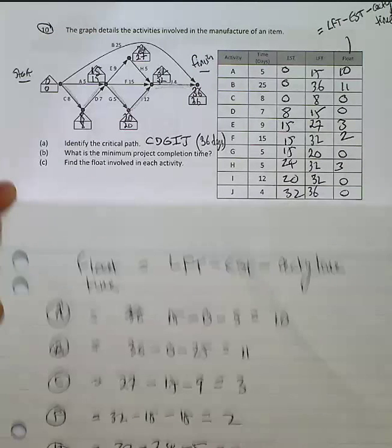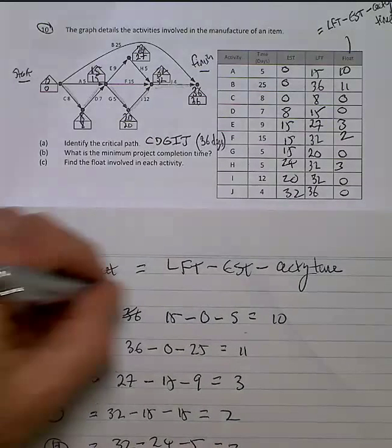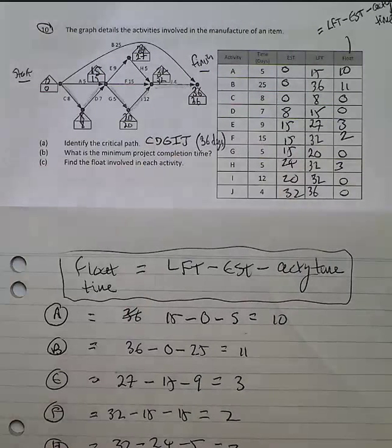Now take some time to work through them. The float time, latest finishing time, take the earliest start time, take the activity time, is there in a form on your formula sheet.